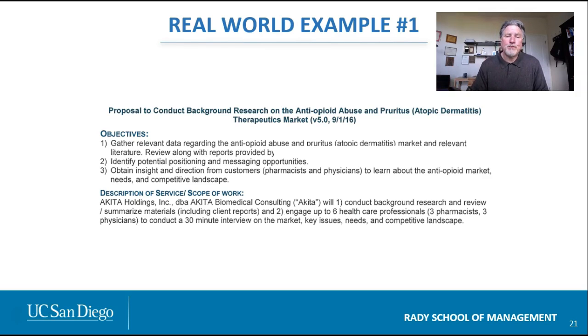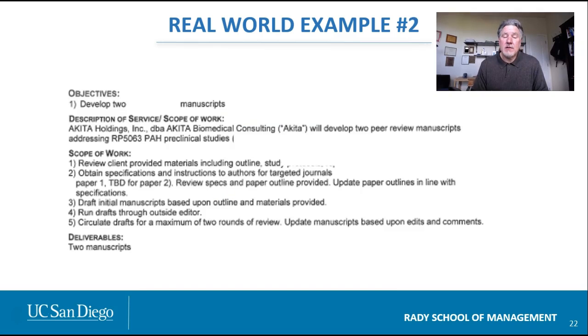Here's another example. It comes from my practice where I have some objectives and a very specific scope of work. This was relative to market research I was doing for opioid abuse and pruritus, or atopic dermatitis therapeutics market, in terms of identifying the ideal indication. As you see, I define what my work is going to be, and my reports are going to be a presentation and also a summary PowerPoint. Here is a second example where the objective is to write 2 manuscripts that help address some preclinical studies of a particular product. Here's the work that would be done, and then the deliverables being 2 manuscripts that are just written, not submitted.